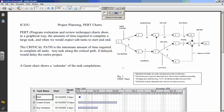PERT Charts show in a graphical way the amounts of time required to complete a large task and when we would expect subtasks to start and end. A big project is broken into smaller tasks. Some of them can be accomplished concurrently — meaning at the same time — so you don't have to do them all one after another. The critical path is the minimum amount of time required to complete all tasks; any task along the critical path, if delayed, would delay the entire project.